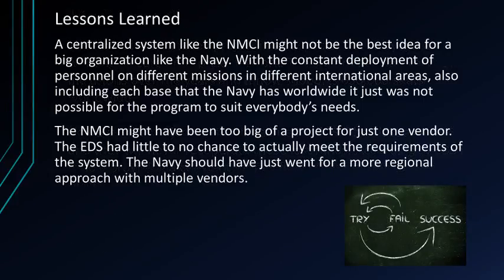Now, what are the lessons learned from this? A centralised system like the NMCI might not be the best idea for a big organisation like the Navy. With the constant deployment of personnel on different missions, in different international areas, also including each base that the Navy has worldwide, it just was not possible for the programme to suit every personnel's needs. The NMCI might have been too big a project for just one vendor. EDS had little to no chance to actually meet the requirements of the system. In my opinion, the Navy should have gone for a more regional approach with multiple vendors.